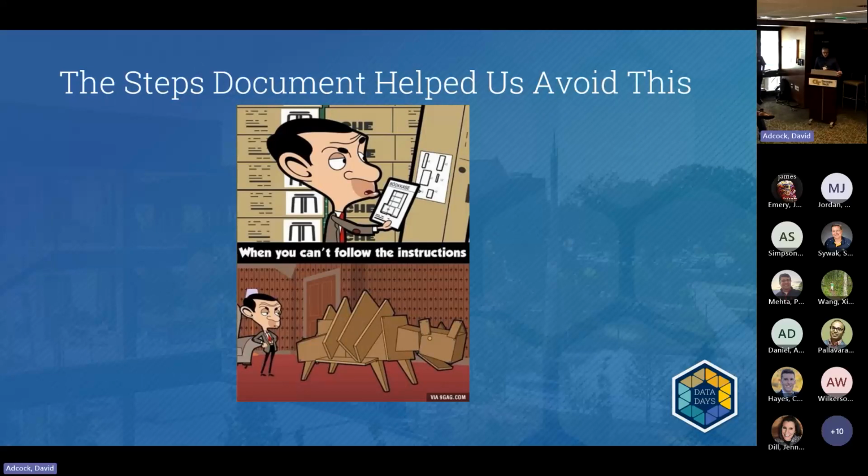I'm going to share information on 4 other documents that we use that are important in this process. Each document builds on the ones prior to it, and these documents get us from customer intake to creating a technical specification. All of our projects begin with an intake form. As soon as someone approaches us requesting an integration, we ask them to complete this form. This form helps us to address challenges regarding project approval and prioritization. We have a process that our customers are expected to participate in.